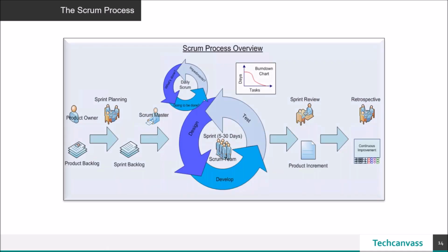We talk a little bit about how Scrum actually works. As we mentioned earlier, it starts from a feature. Feature is broken down into an epic. Epic is further broken down into a product backlog, which is basically defined by the product owner or the business analyst. There is a team meeting which is called sprint planning, where you define, okay, from maybe a large bucket of backlogs, what all backlogs you want to pick up for that particular sprint.